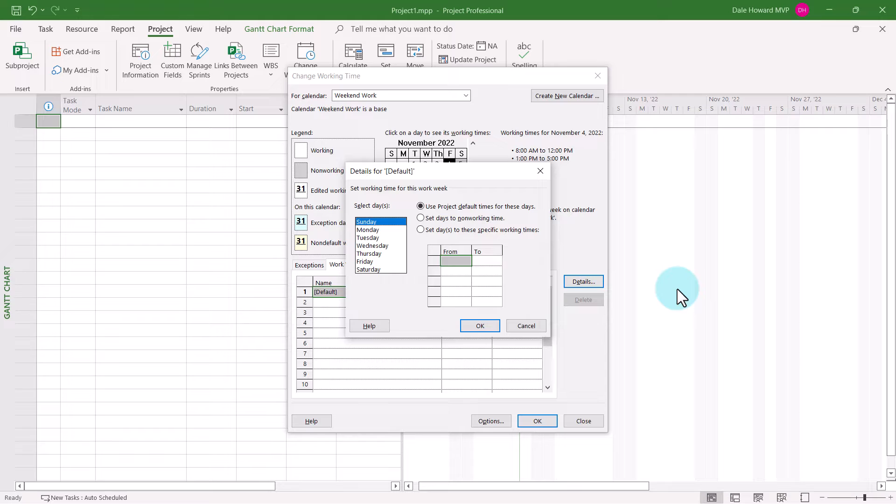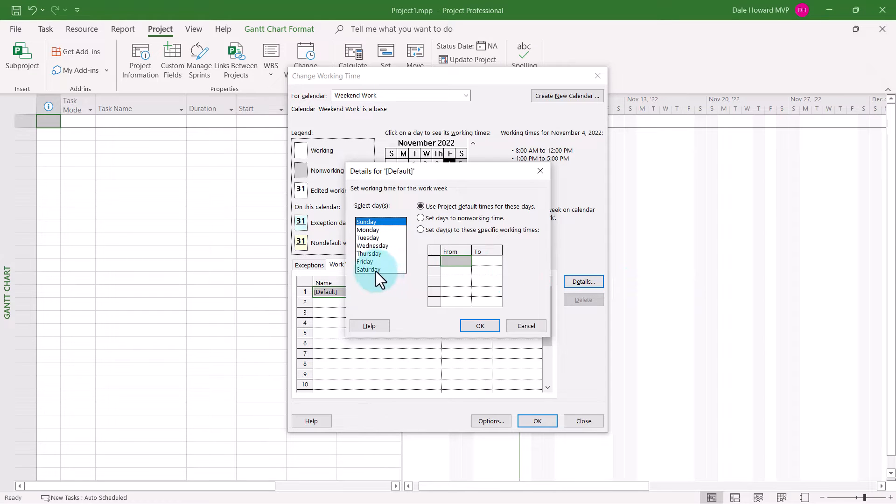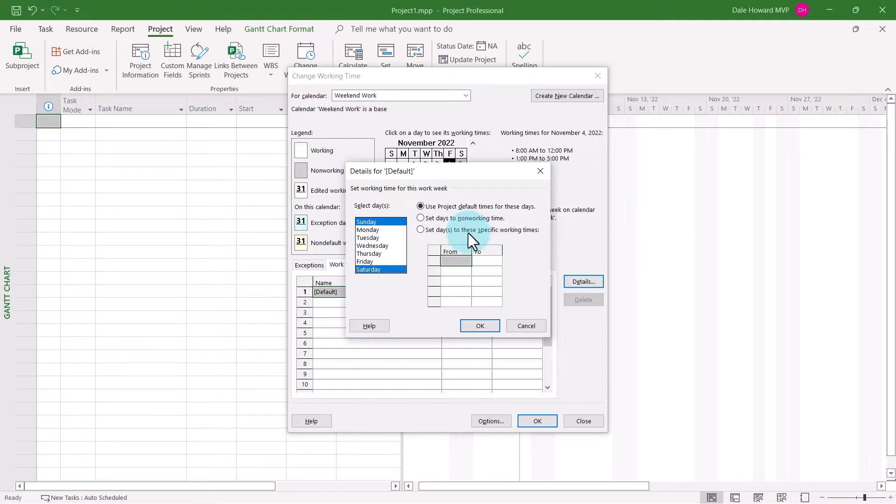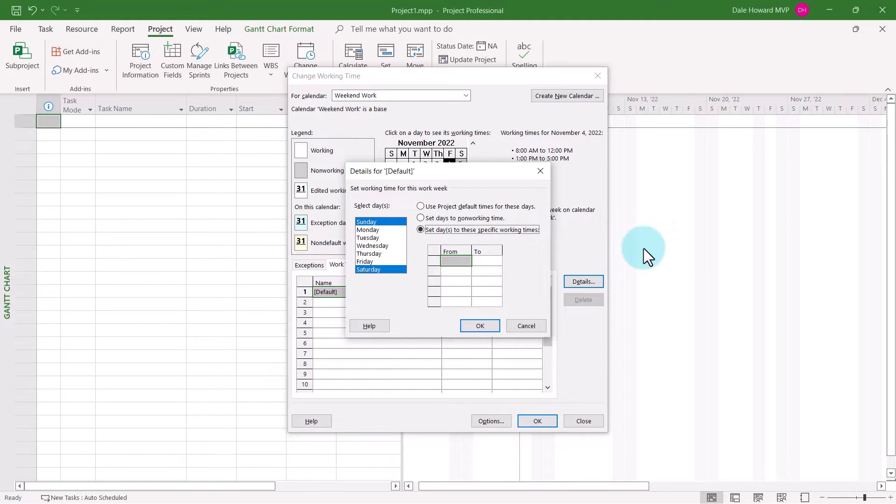In the Details dialog, this is where to set up the custom working schedule. In my case, I need to select Sunday and Saturday and then make them working days. To do this, I'll select the third option, set days to these specific working times.